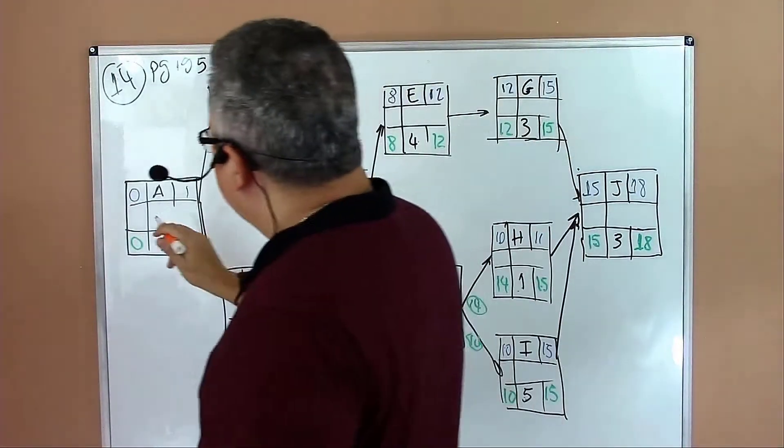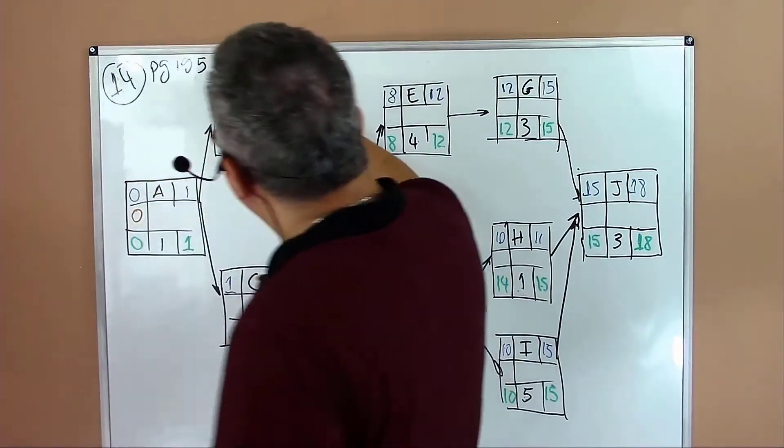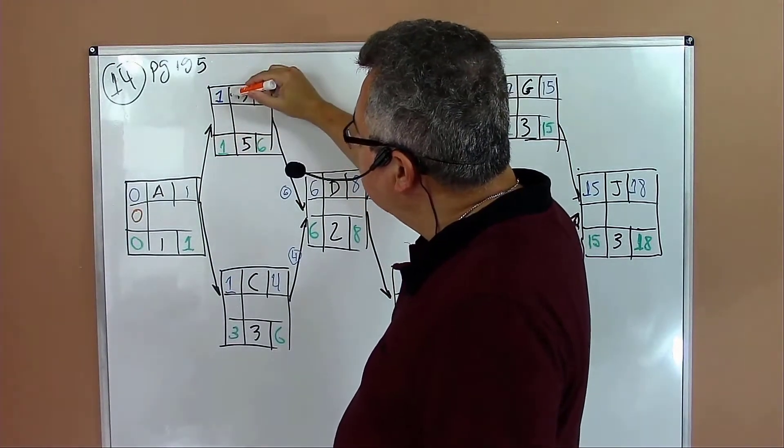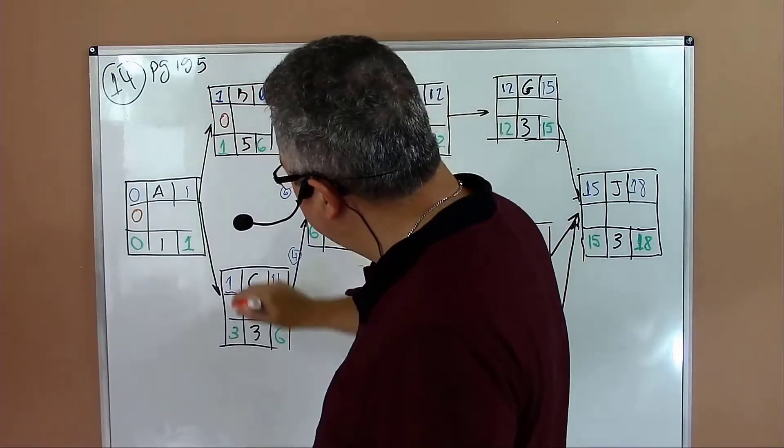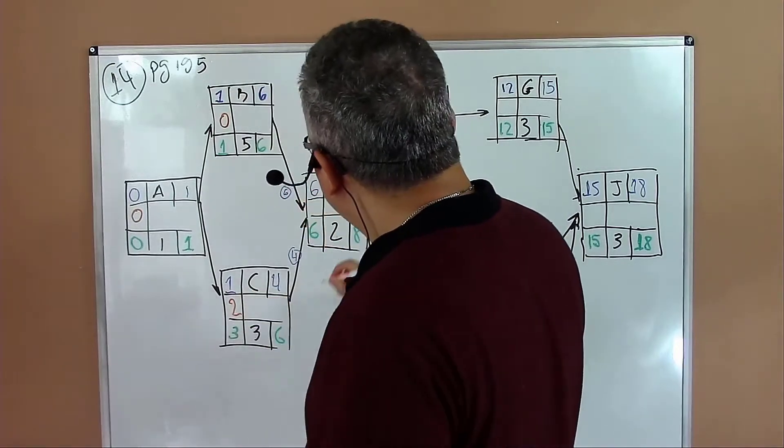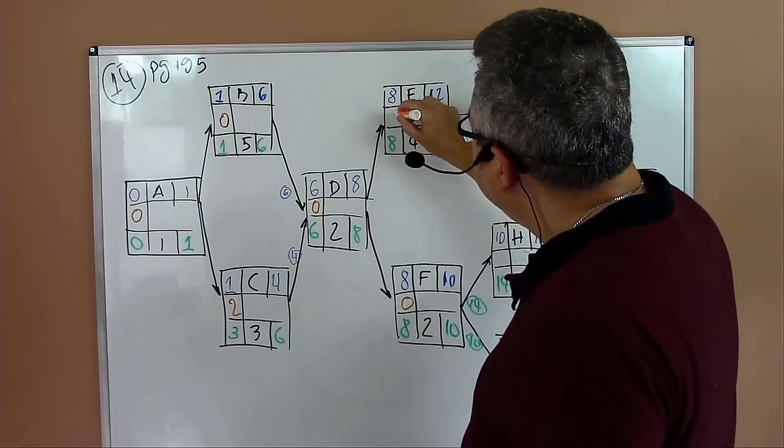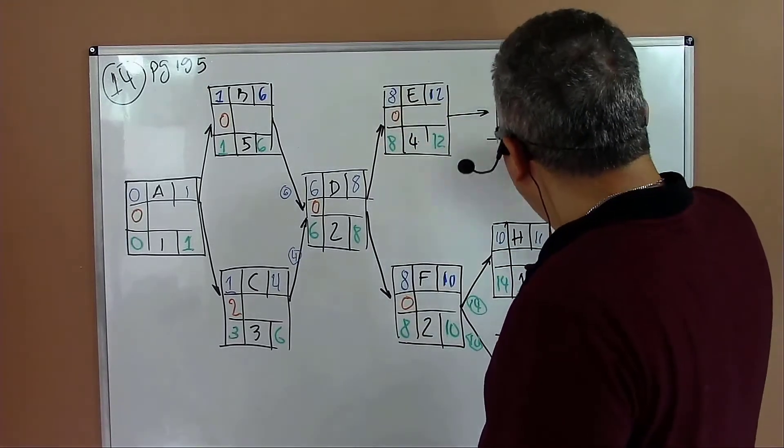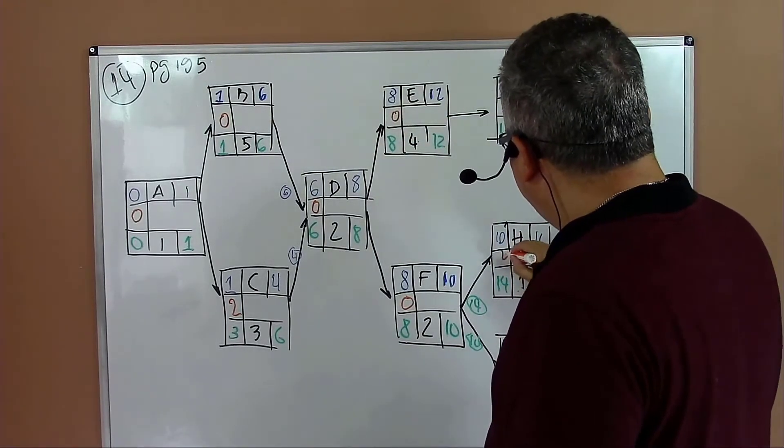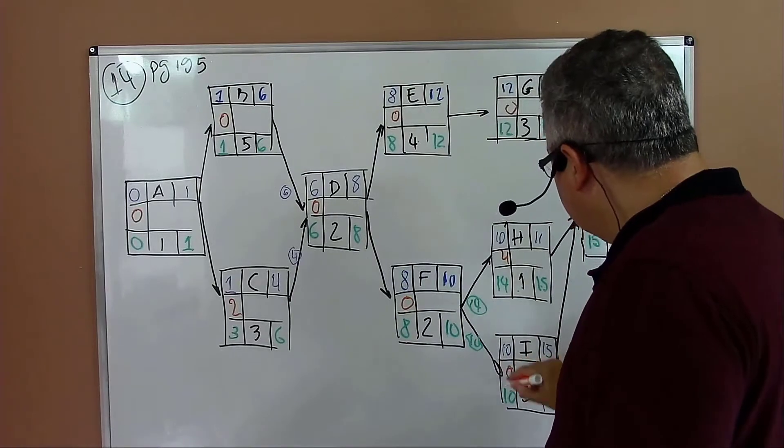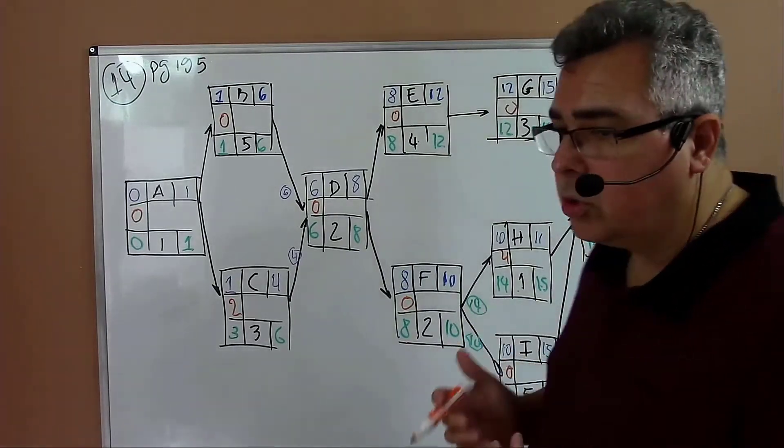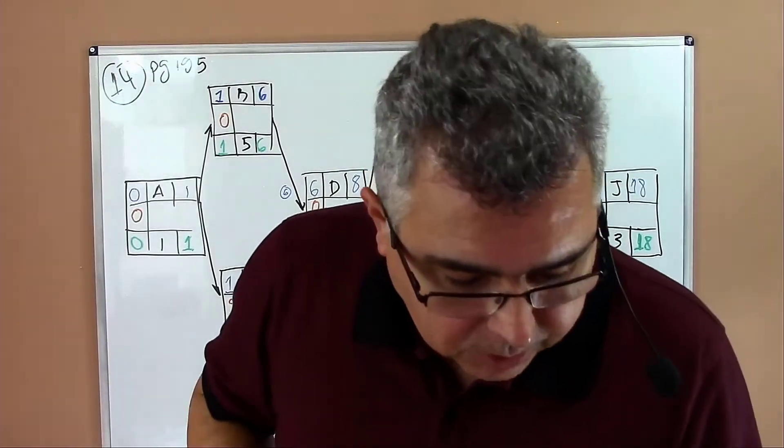Now we have to compute the activity slack. Here we have zero for activity A. The slack is late start minus early start. Zero here for B, two for activity C, zero for activity D, zero for activity F, zero for activity E, four for activity H, zero, zero.